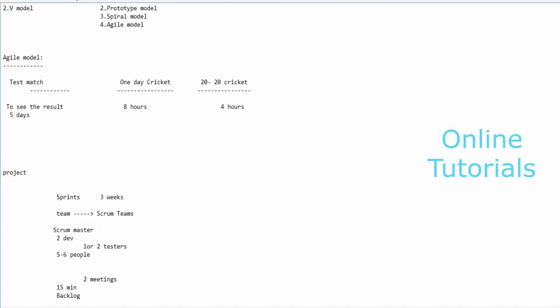After completion of the work, at the end of the day, again they will combine at one place and conduct another meeting, 15 minutes again. They will review what work we did today, what difficulties we faced, how much work has been completed, how much is pending, and what tomorrow's plans are. They will analyze things on a day-by-day basis, and after that they go for further implementation. This is the internal process which goes on in the Agile process every day, on a daily basis.